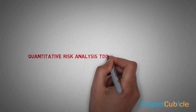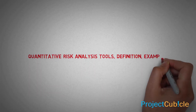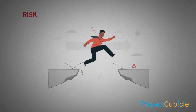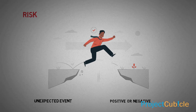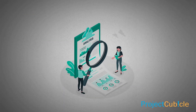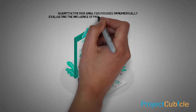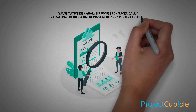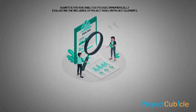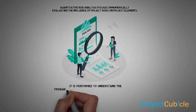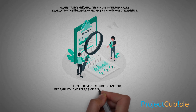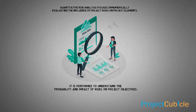Quantitative risk analysis tools: definition and examples. Risk is any unexpected event that has the potential to affect the project goals, either positive or negative. Quantitative risk analysis focuses on numerically evaluating the influence of project risks on project elements. It is performed to understand the probability and impact of risks on project objectives.